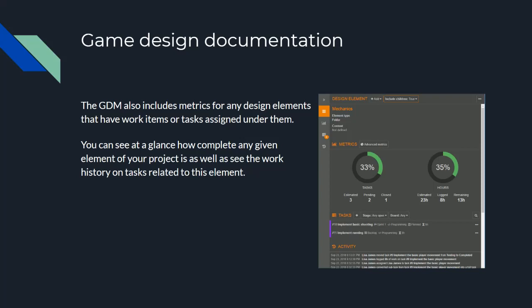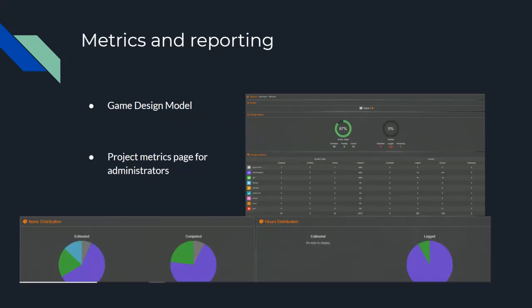Additional metrics are provided by HackNPlan on the Project Metrics page, which is accessible by project administrators. The images shown here on this slide come from a sample project metrics page and it lets you see the completeness of the current board. In this case, the board represented a single sprint in an Agile or Scrum based project. You can further see the hours logged and estimates remaining, number of estimated pending and closed tasks, and how these tasks are divided up among various categories of items. One example of this usefulness that has happened to our team in the past was to see when a graphic or sound artist was overworked compared to the programmers and allow us to better distribute the planned work for the upcoming sprints.